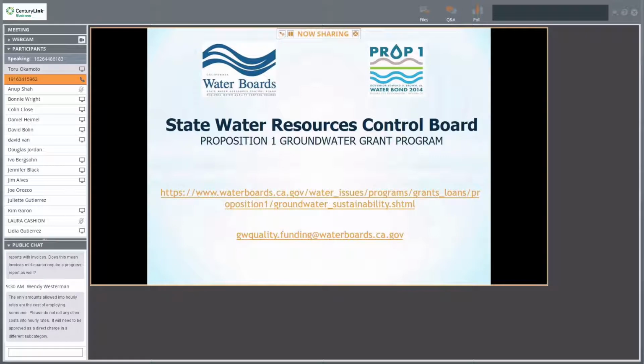I don't think we're expecting that. So, say for the example, the more detailed backup, like their timesheets, we're not expecting you guys to keep that in your files. Yeah. Okay. Should we require for your subs, for your own staff, of course, you should have that available because that's the type of thing an auditor might ask you for. But for your subs or your contractors, I don't think that's the expectation.